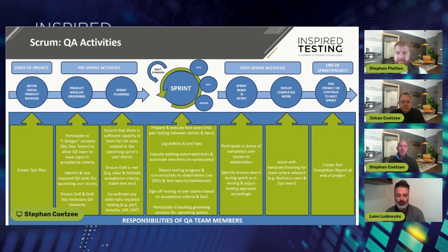But I've seen lots of times where testers find a defect at, let's say, 11 o'clock in the morning, a few hours after stand-up. They don't report it on Teams chat. They just log it. They don't assign it, or they just assign it to the dev or the lead dev, who maybe doesn't pick it up, and it only gets spoken about the next morning in stand-up, and a whole day has gone by with a critical bug and a whole day potentially wasted. So I think the communication thing is assigning it to somebody, but also following up: 'Listen, I assigned this to you. Are you aware of it?' Maybe make sure there's a Teams chat. That communication, that fast turnaround time, is not to be overlooked or underestimated.